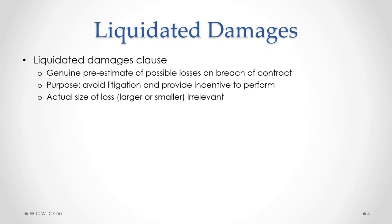Liquidated damages is where there is a specific clause in a contract — the liquidated damages clause — which provides a specific amount of damages that an innocent party from a breach of contract is entitled to. To be a proper liquidated damages clause, that amount has to be a genuine pre-estimate of the possible losses that may arise on a breach of contract. The purpose of including a liquidated damages clause is to avoid litigation, avoid a dispute as to the amount of damages, and provide a clear incentive for parties to perform.